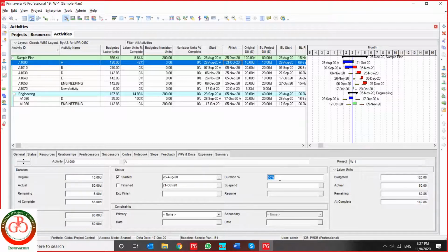But it only works the first time. If I made a mistake and want to change it and recalculate it by 16, now you can find it does not work, because 16% is calculated based on my remaining duration, not from my budget.